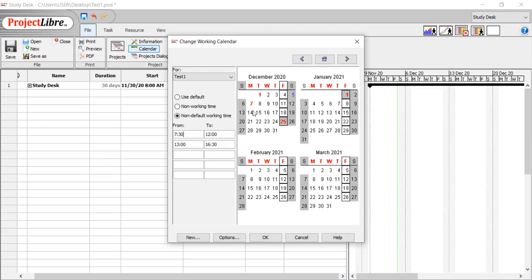And what about the holidays? Here you see that some days like 25th of December and 1st of January are holidays according to the company policy. And how you can do it, you can, for example, select this date and click on non-working days. You see that it changed to gray, which means it's a non-working day. Okay, that's all the important information about making a calendar.